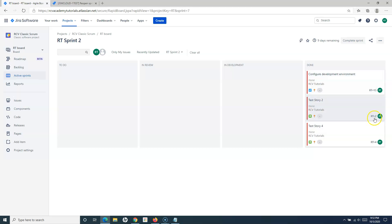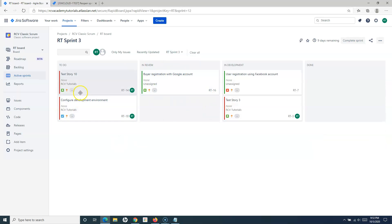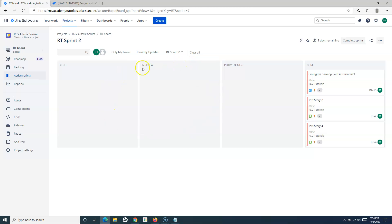Now in the active sprints, you can see RT2, RT4, and RT15 issues are available there. The other issues were moved to RT Sprint 3 when we planned RT3 or closed RT Sprint 2, so they remain in RT3. You can now see the parallel sprint feature enabled, with multiple sprints active at the same time.